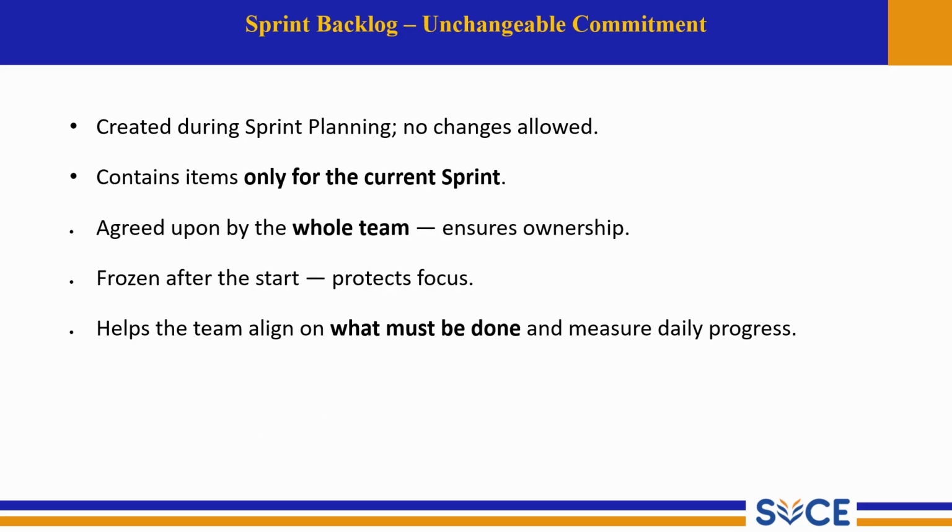And in the next slide we'll see the sprint backlog, an unchangeable commitment. It is created during sprint planning, and no changes are allowed. It contains items only for the current sprint. It is agreed upon by the whole team, which ensures ownership. Frozen after the start, it protects focus. It helps the team align on what must be done and measure daily progress.